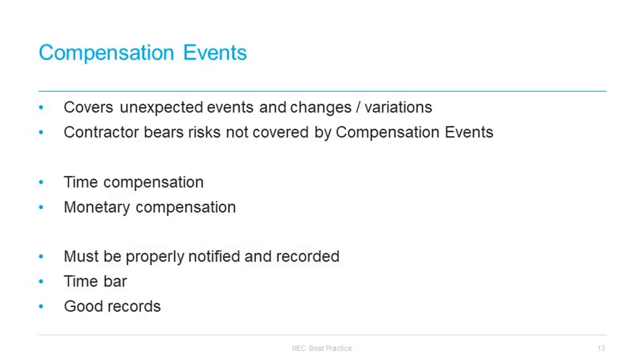And we reiterate that the absence of a timely early warning notice does not preclude the contractor's recovery of compensation, whereas the absence of a timely compensation event notice does. The absence of a timely early warning notice, as we've said, really just changes the calculation.